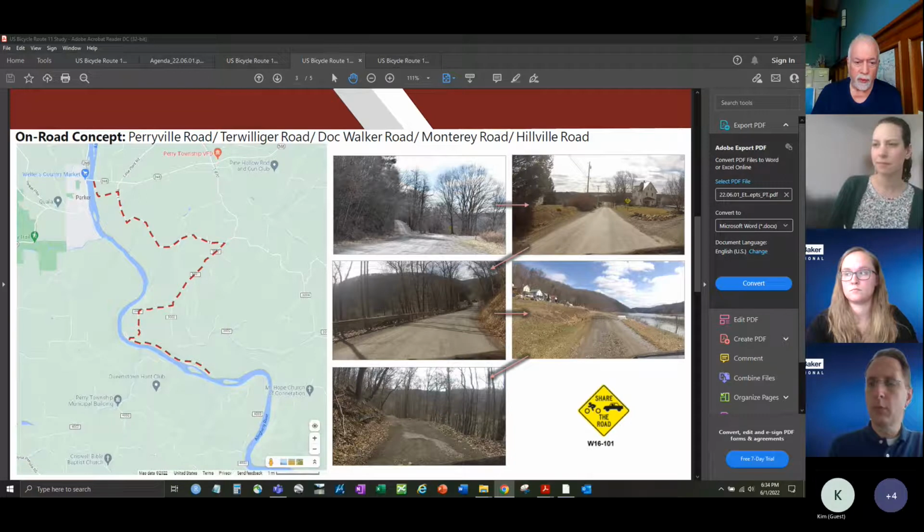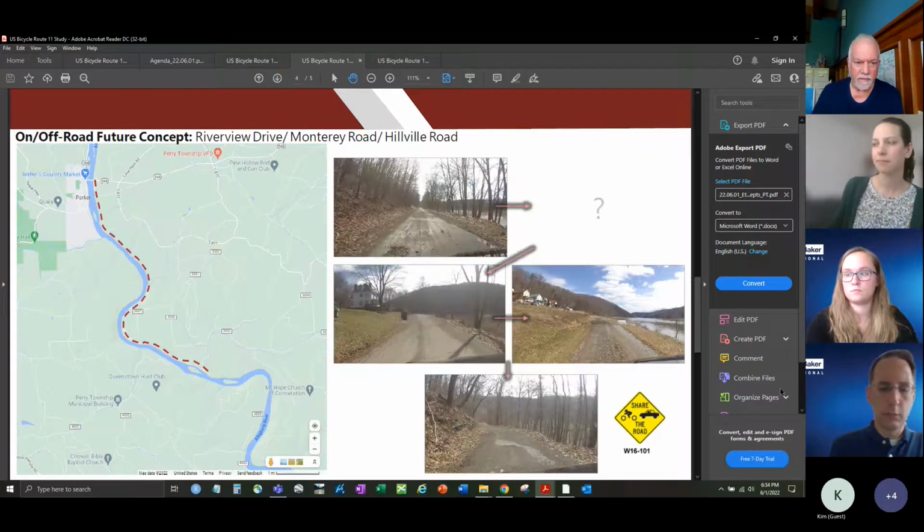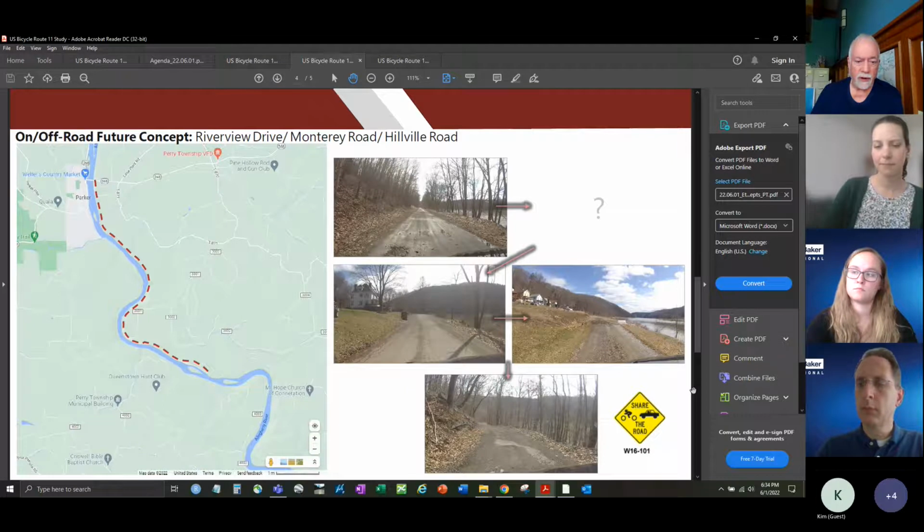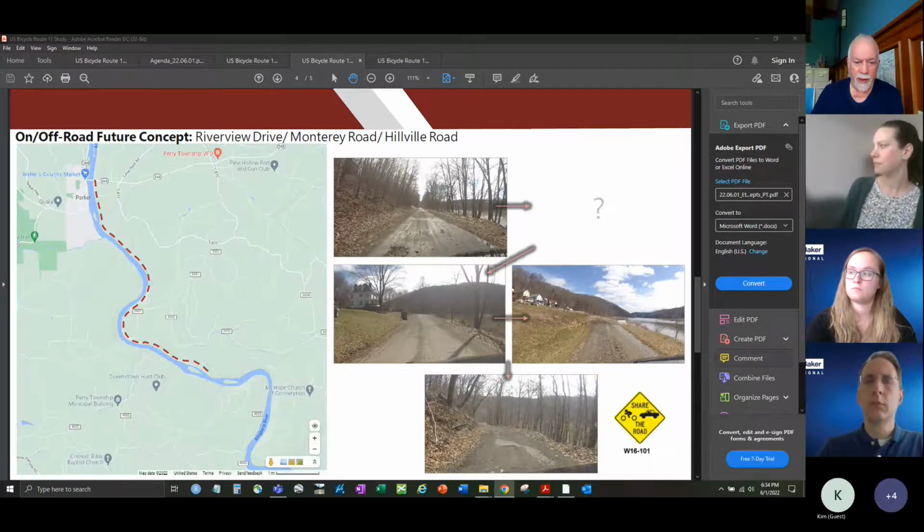Some are very pro-bike trail, and we have allies down there. It's going to take money, time, and heavy lifting to negotiate enough easement agreements that people see that it really is a benefit to develop the bike trail. And then once that engine really gets rolling, there are some people that have built their houses right up against or on top of the railroad corridor. So you're going to have to bypass that. There is enough land that you can certainly bypass it, but that's going to be money and cost.